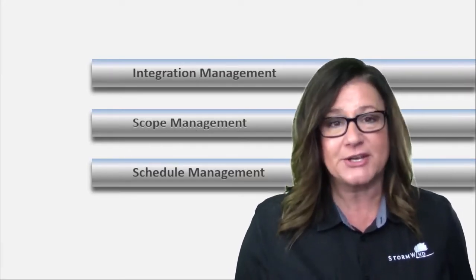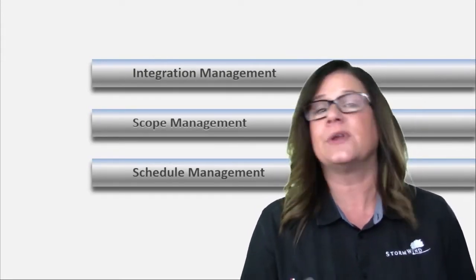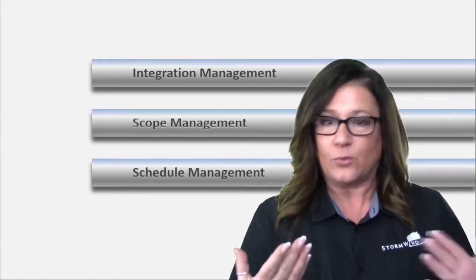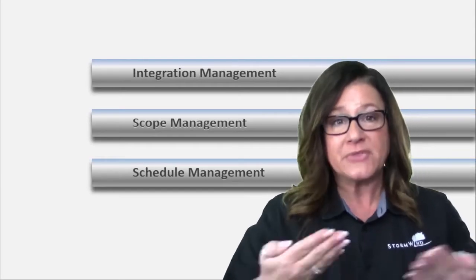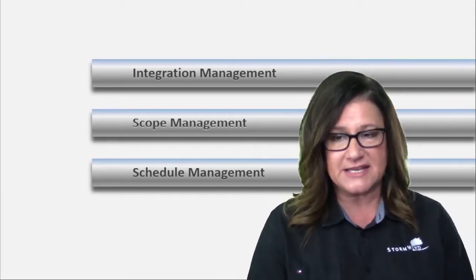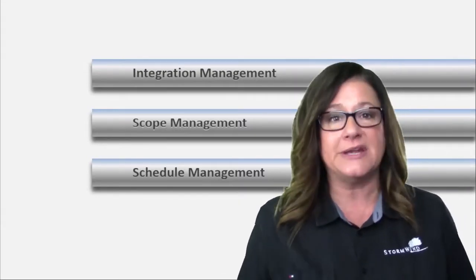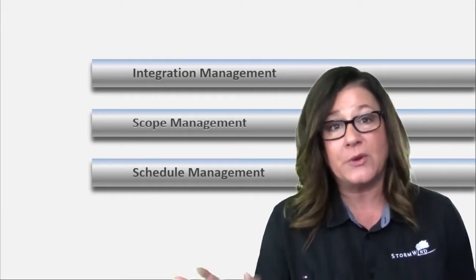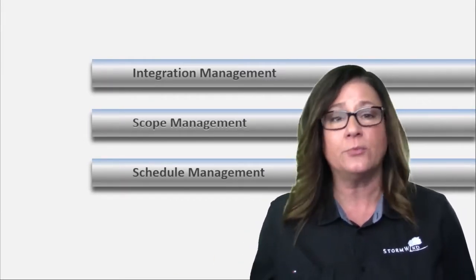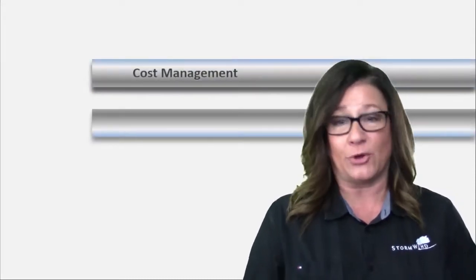Once we begin to execute project work, we're going to be keeping a close eye on that schedule baseline, and we're going to be comparing actuals. Well, it says in our baseline it should have taken 30 days. It took you 40 days. Now we can start to compare and contrast and see, have we bounced so far ahead or behind schedule that now we need to take some kind of corrective action? We always want to be keeping an eye on our schedule, usually weekly, although not every project manager manages their own schedules, but it is more common than project managers managing multiple budgets.